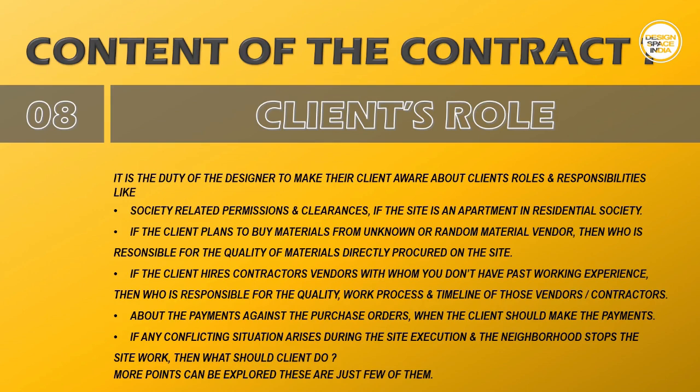1. Society-related permissions and clearances. In case it's an apartment project, most of the time it is mandatory to get a no objection from the society members before the work is started. The designer has zero role in this. All the compliance is to be done by the client. 2.